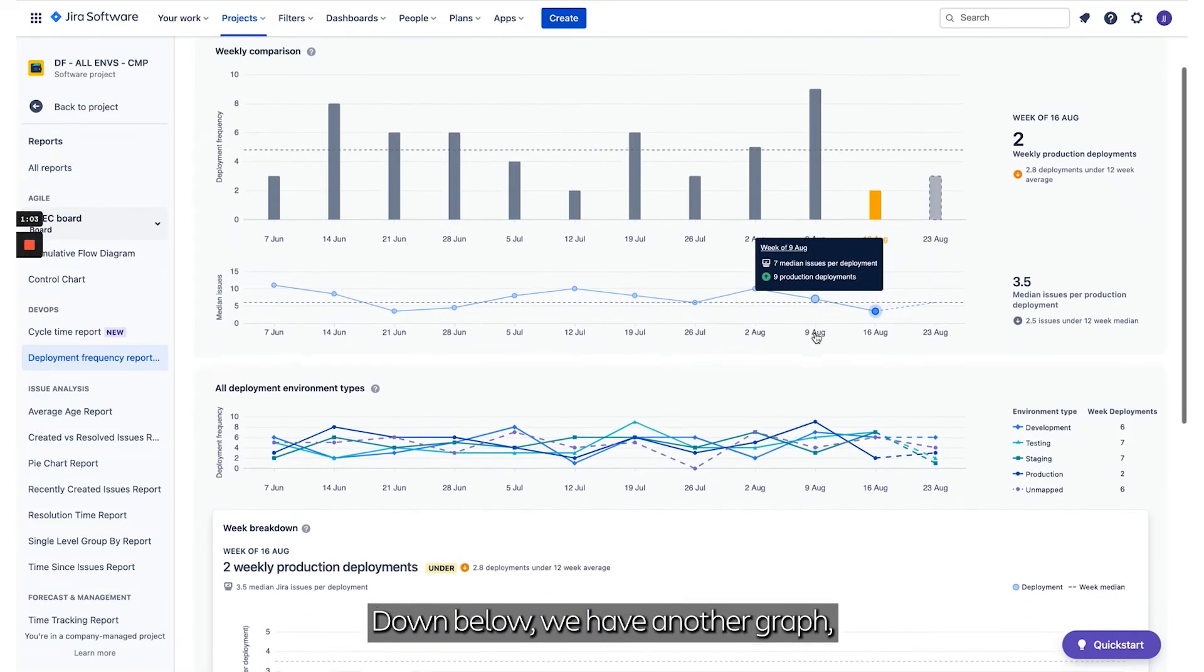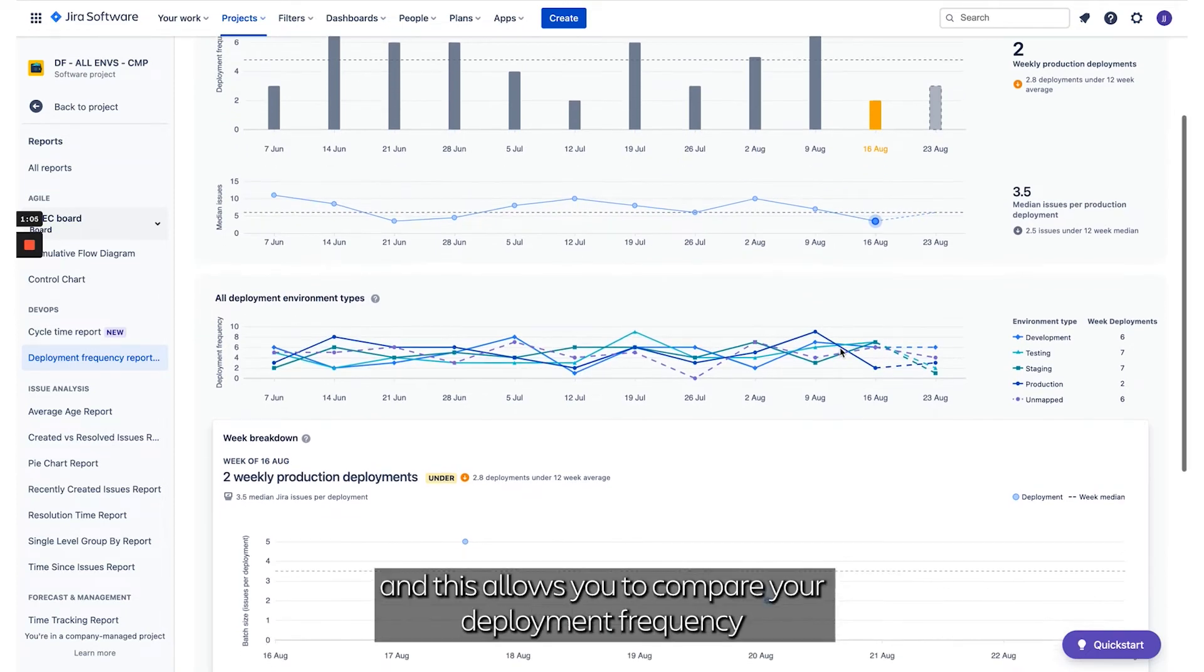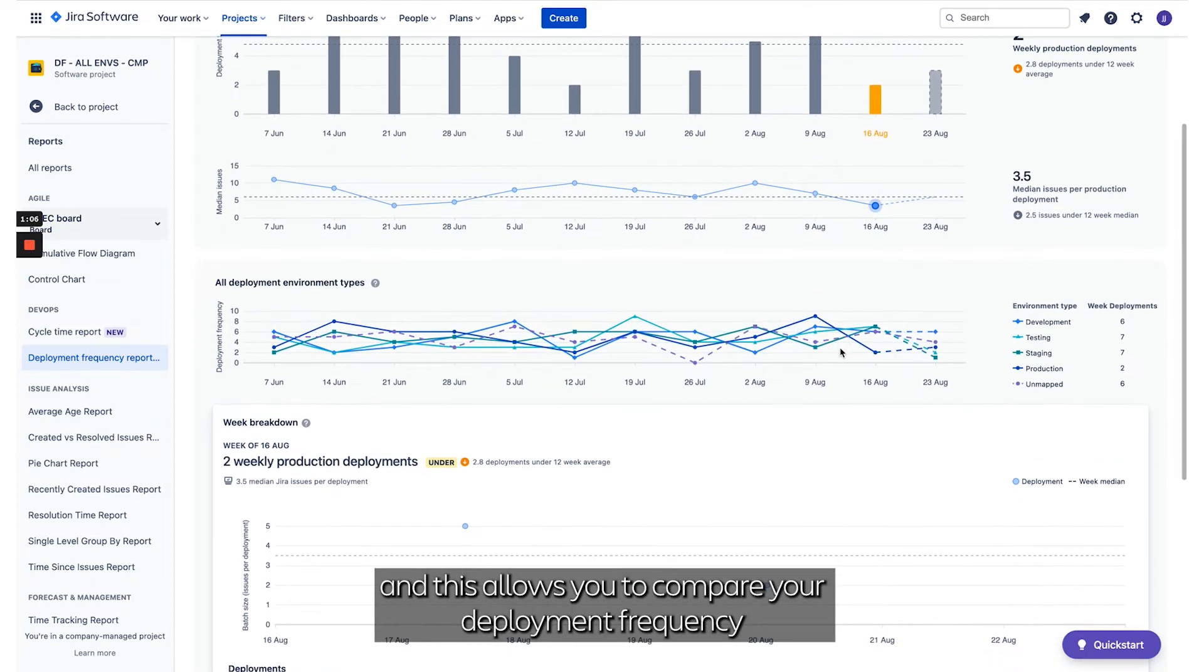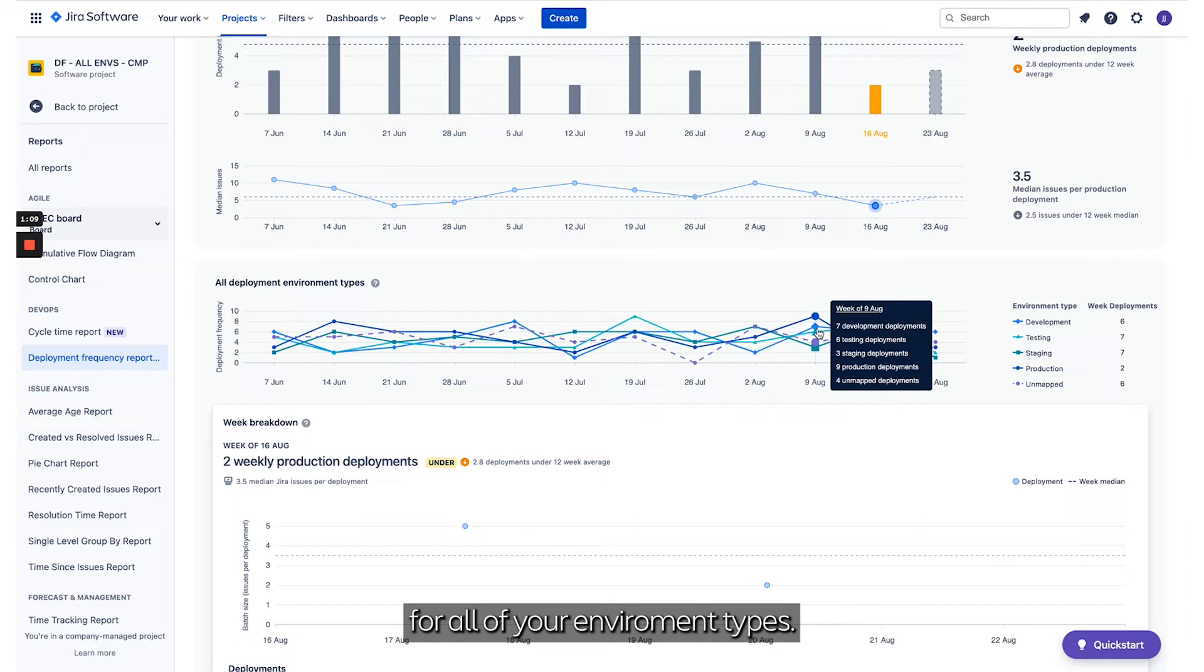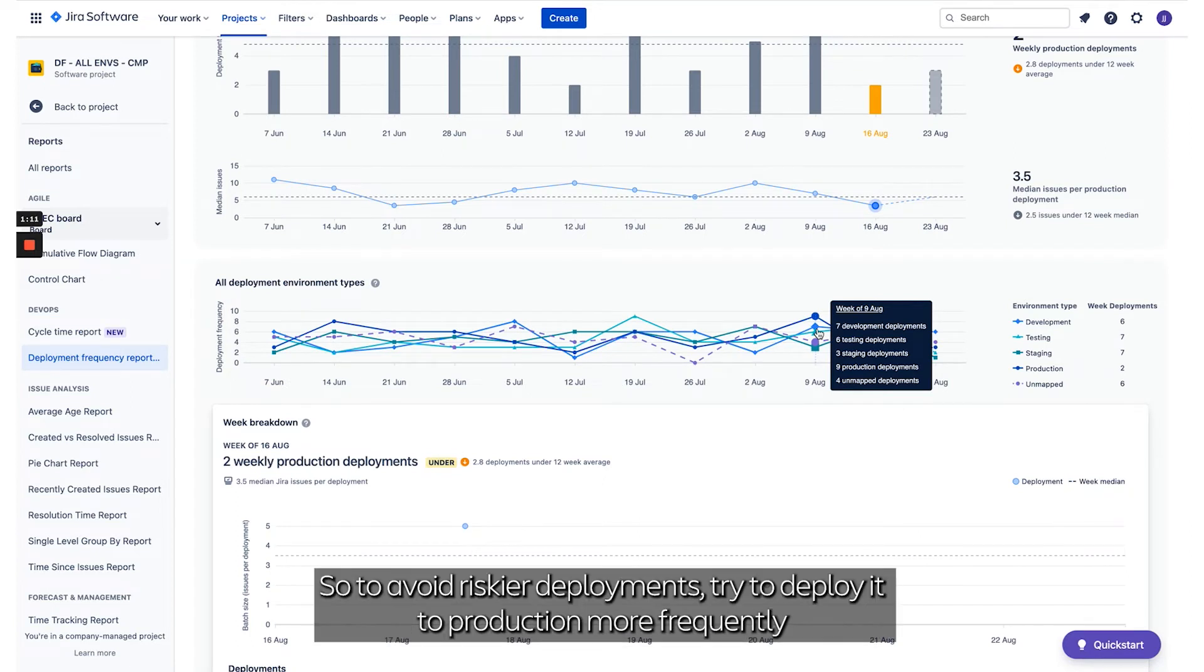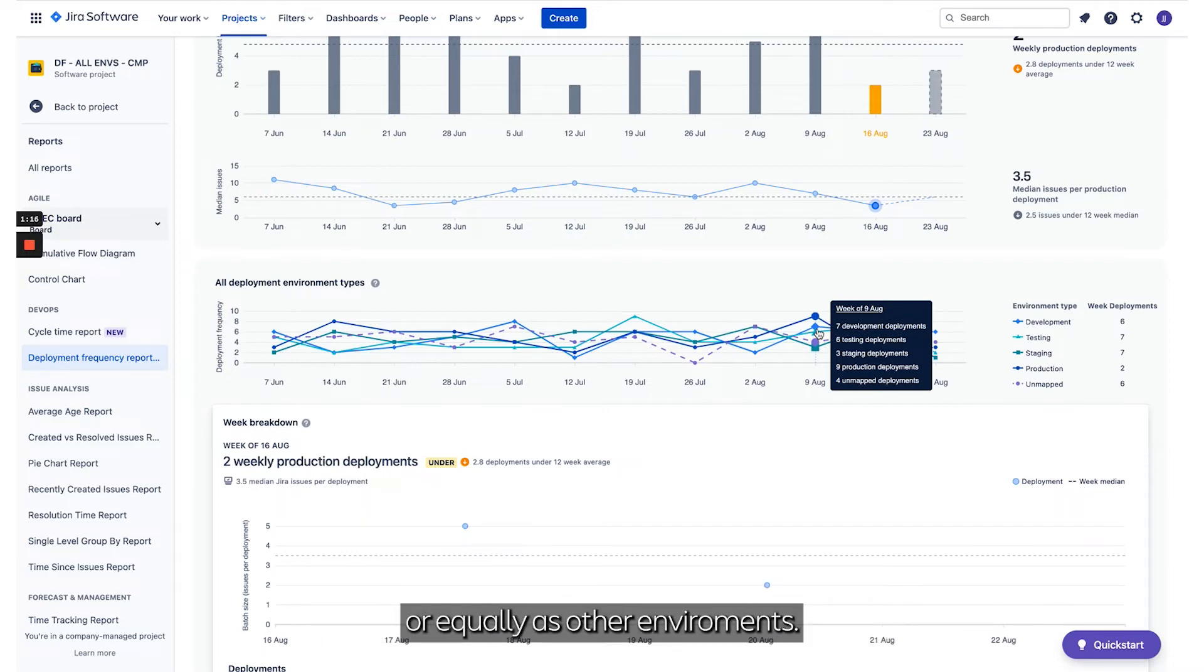Down below we have another graph that allows you to compare your Deployment Frequency for all of your environment types. To avoid riskier deployments, try to deploy to production more frequently or equally as other environments.